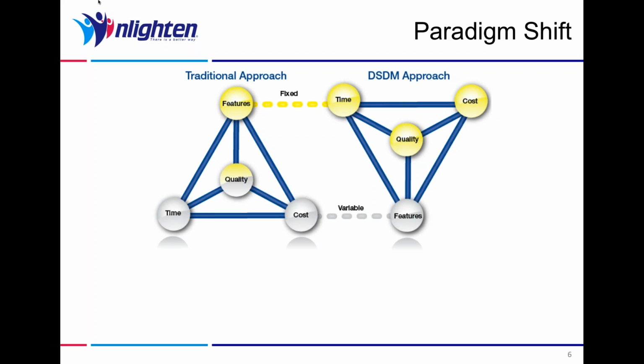To understand the fundamentals of what's needed, not all the detail, just fundamentally what we need, we should be able to estimate the work and fix the time and the budget, the cost of our project, also fix the quality, and if we deliver our solution incrementally, time box by time box, or let's use a more common term from Scrum, sprint by sprint, we should end up in a position of being able to judge every couple of weeks whether what we've built is at the right level of quality or not. The variable in this becomes the features, the scope of the features that get delivered.